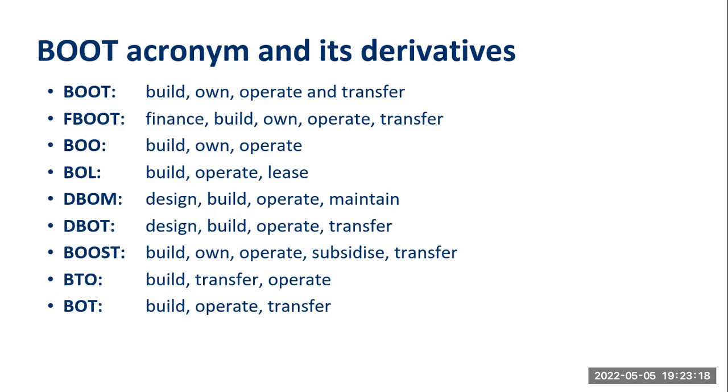Then we have the F-BOOT, which is to finance. The only thing added there is finance. Build, own, operate, transfer is still as it is, but here the investor, or the financier, the construction firm or the contractor will be the one to pre-finance all the costs of the construction. The financing may be partly done by the investor, or everything will be financed by the investor.